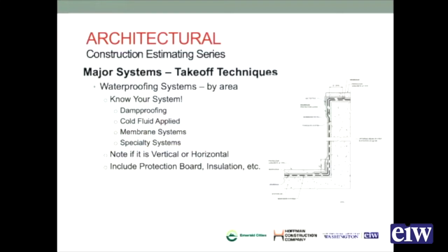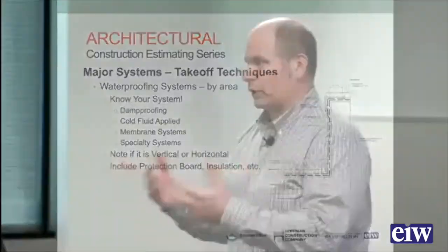And if you've run your waterproofing well past where they can form, the concrete sub is going to have a challenge forming that up and not damaging the waterproofing. You want to make sure that you are working together so that both trades are efficient. The concrete sub may be there first, and they may have bid it one way, and you need to make sure that you're coordinated.